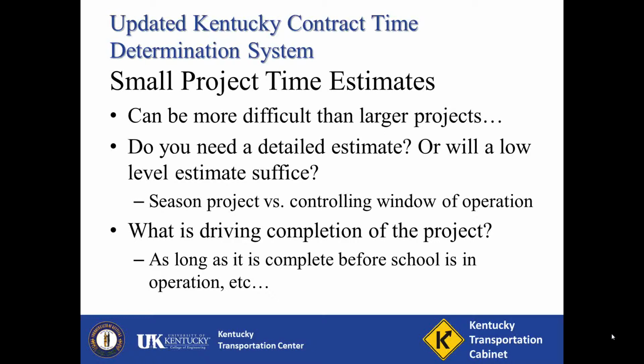Do you need a detailed estimate, or will a low-level estimate suffice? Consider the project. Is this something that will take longer than one construction season? Is there anything controlling the window of operation? That is, does it need to be started and completed while school is out of session? The answers to these questions could negate the need for this process altogether.